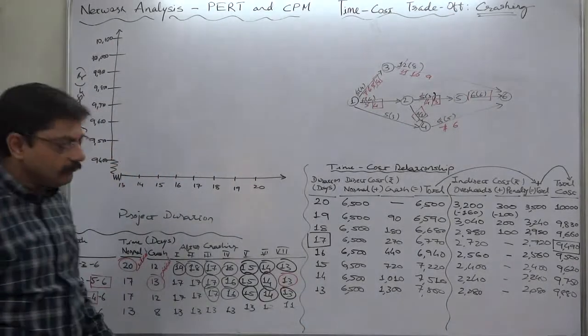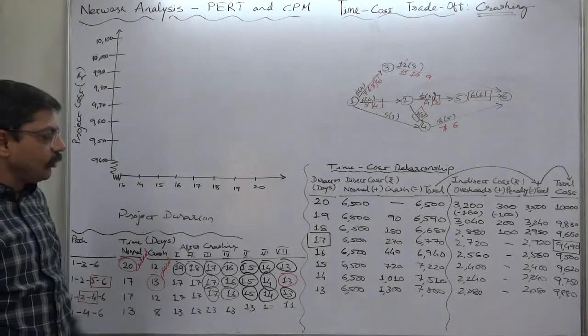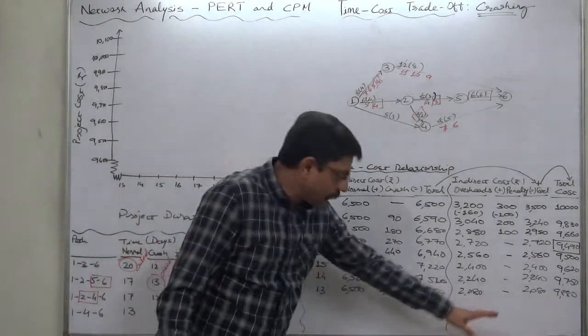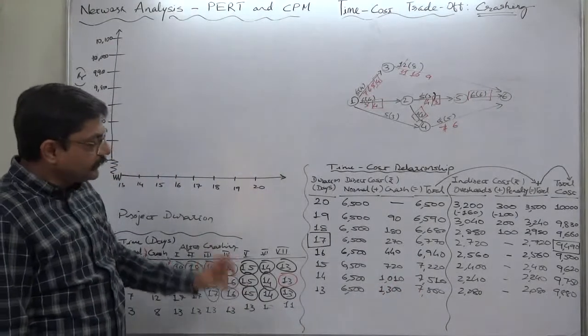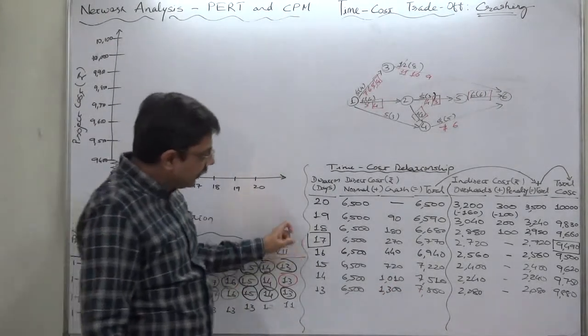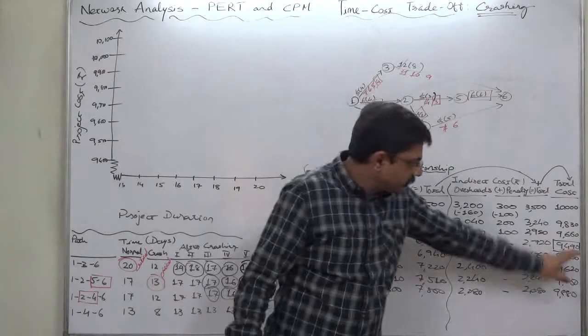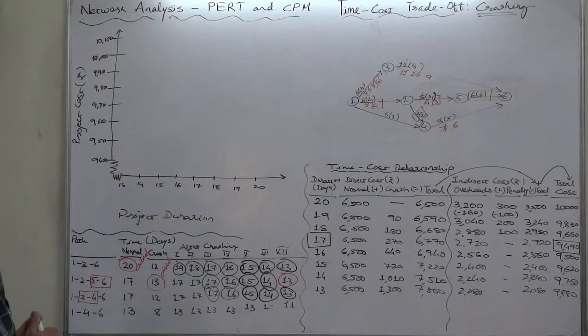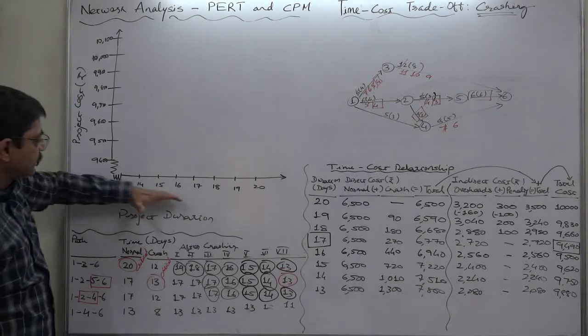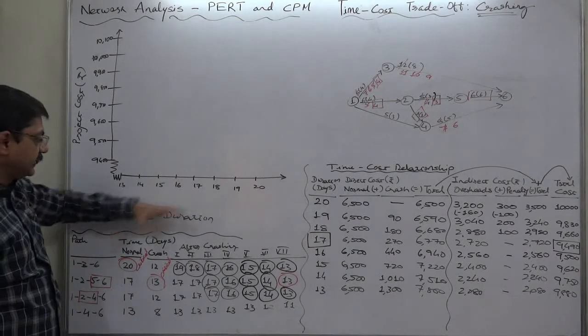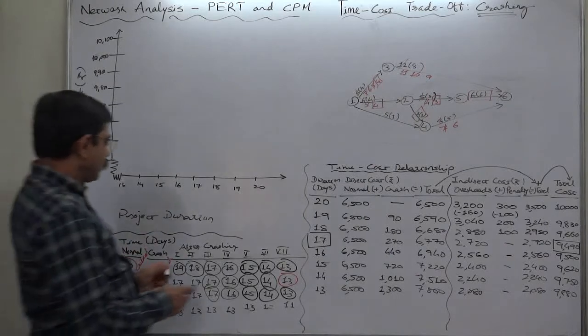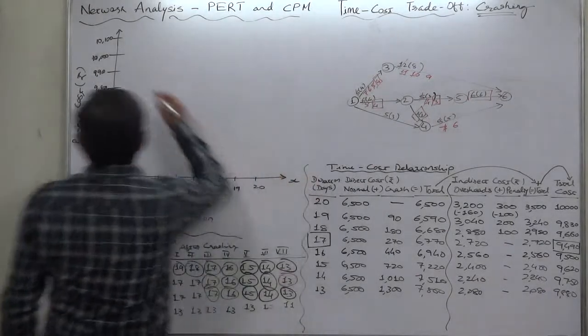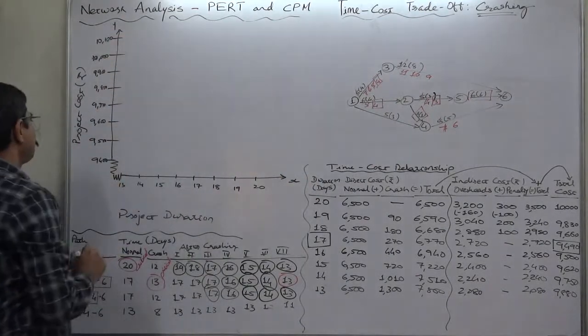This project is going to take at least 13 days to complete. But the optimal duration is 17 days because it has the lowest possible cost. Now let's try to plot the relationship between time and cost on a graph. Please take a graph paper and you can take the scale of 1 centimeter on this x-axis which shows project duration and this shows project cost.